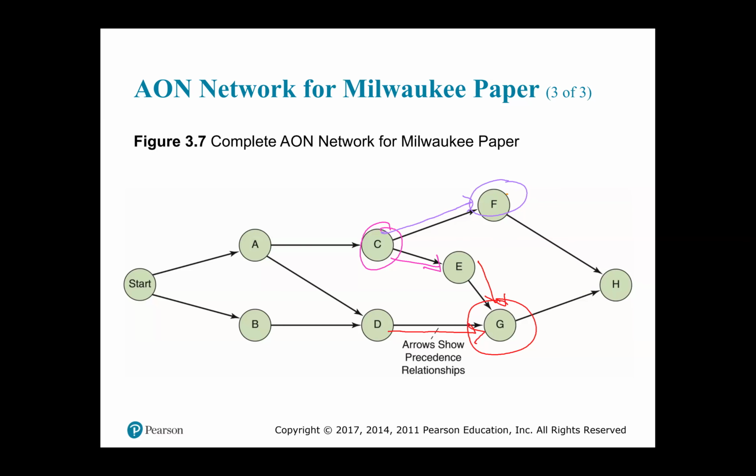And when you come now to H, the last listed activity, which is inspect and test, you find that for H, you need to have had activities F and G completed. So there is that blue line coming from F going to H, also from G going to H. Now, you need one last node, and that is called your finish node.